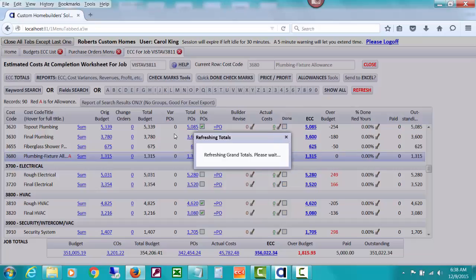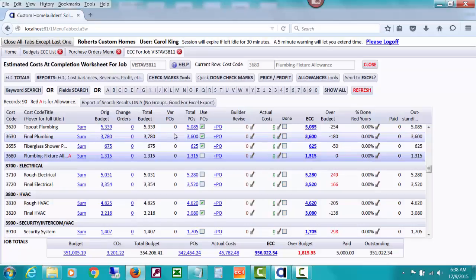And then if you run, like in a previous video, a report of all the variance POs, you'll see both of those variance POs, but you'll see one and then you'll see that you backcharge somebody else. To do this backcharging, it doesn't have to be that your original PO is a variance PO, but you might want to so that you have a list of variance POs that show what you did with them and what happened.